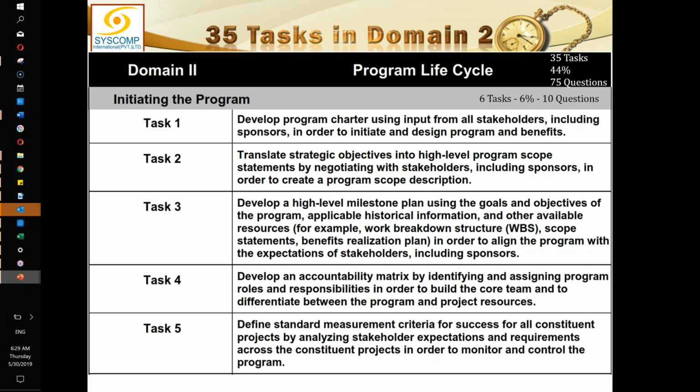But at a very high level, after we have the charter and the program scope statement, we are set up to define some of the major milestones of the program. And for that, we will be using the goals and objectives of the program, which have already been established earlier, applicable historical information and other available resources, that could be the work breakdown structure, scope statements, benefit realization plan. You remember, the benefit realization plan was developed in strategic program management. This is in order to align the program with the expectations of stakeholders, including the sponsors. So basically, the main output here from task 3 is the high level milestone plan.